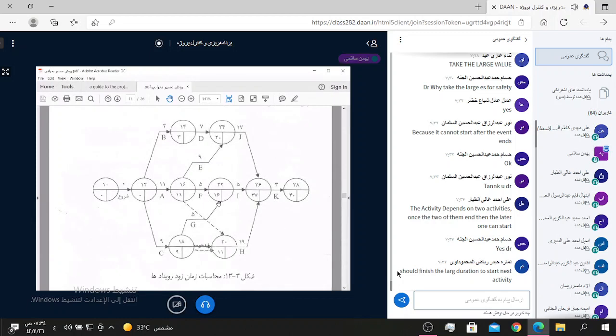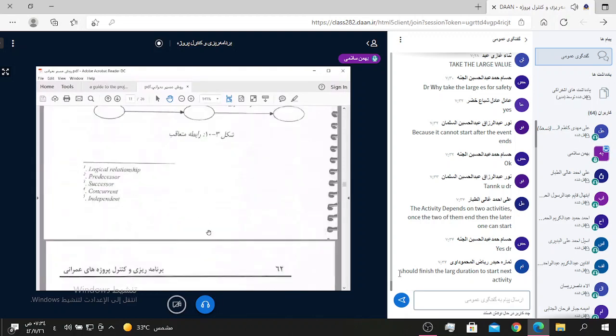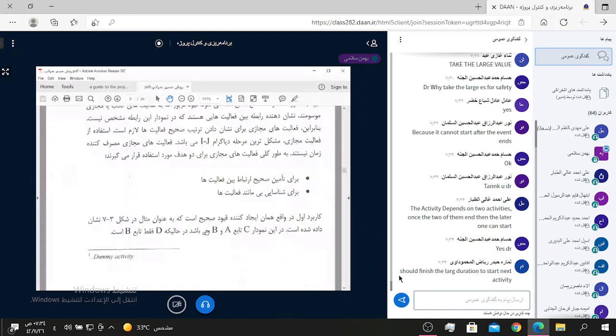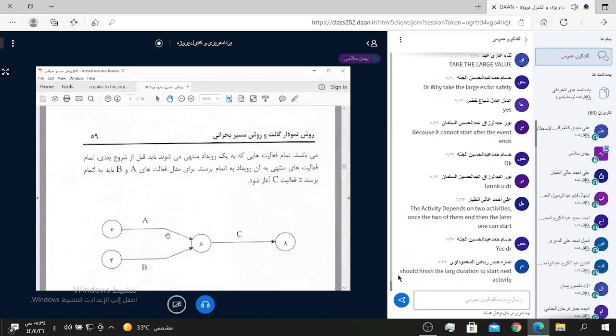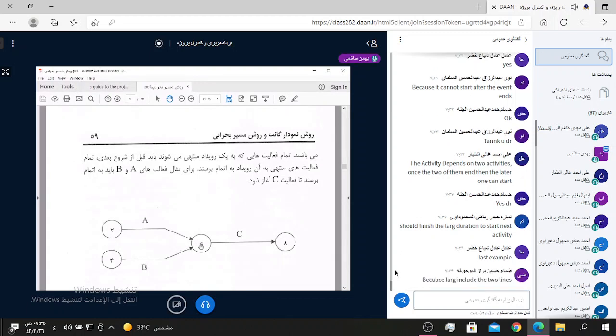Yes. As you remember, for example, I said before, activity A and activity B should finish, then activity C can start.